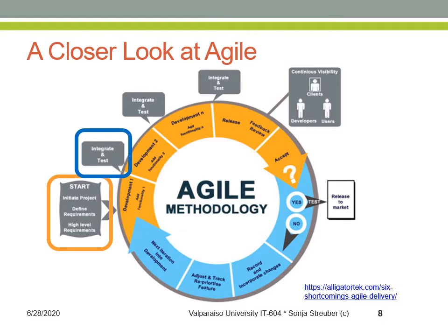And as we prepare for this development with the user stories that come in our sprint backlog, we develop the test plan. In fact, we develop the test plan first before we even start developing the code. That way, we have a much better idea as to how we need to write the code, here called development 1 through development n, to pass the tests. So then, our first increment is done after 2 weeks, followed by the sprint review, in which we demonstrate what we have built, and the sprint retrospective, in which we discuss how well and how fast we have built our product and what went well and what didn't.